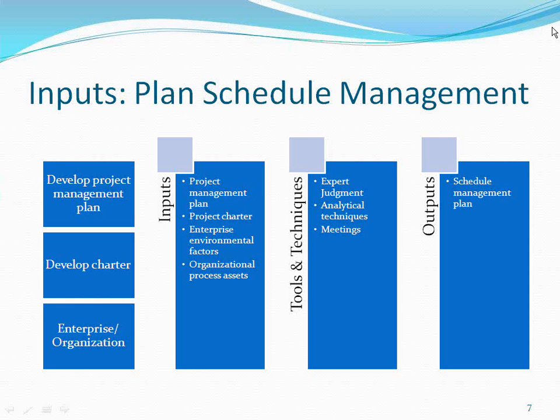So this project scope statement will be very handy for you in order to plan your schedule. This project scope statement is in scope baseline and this scope baseline is in the project management plan. That is the reason you require an input called project management plan. And then the project charter. Project charter contains the high level outline schedule of the project. That will help to the extent in order to understand your schedule planning or schedule management. It will have the milestones which you have identified in the project. So project charter is a document which will help. And EF and OPA.